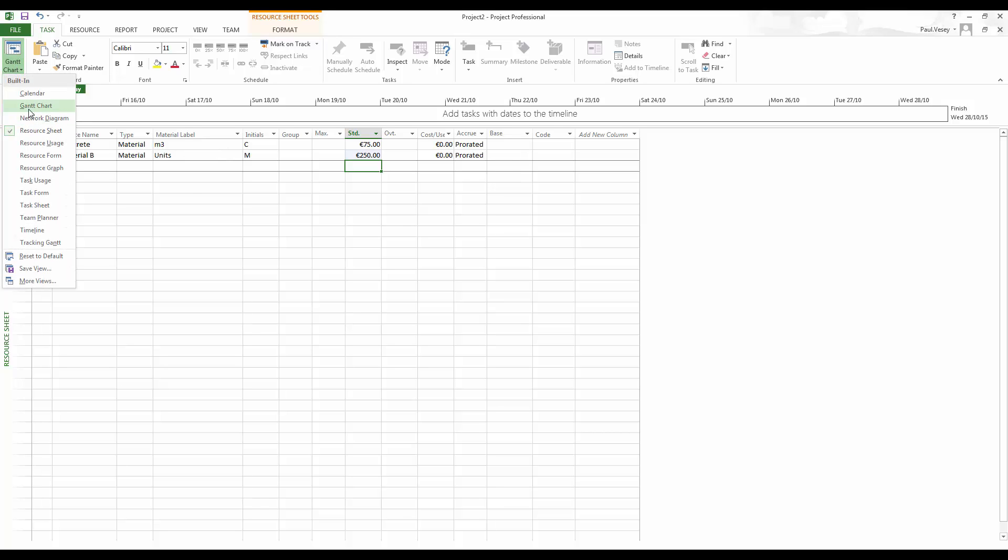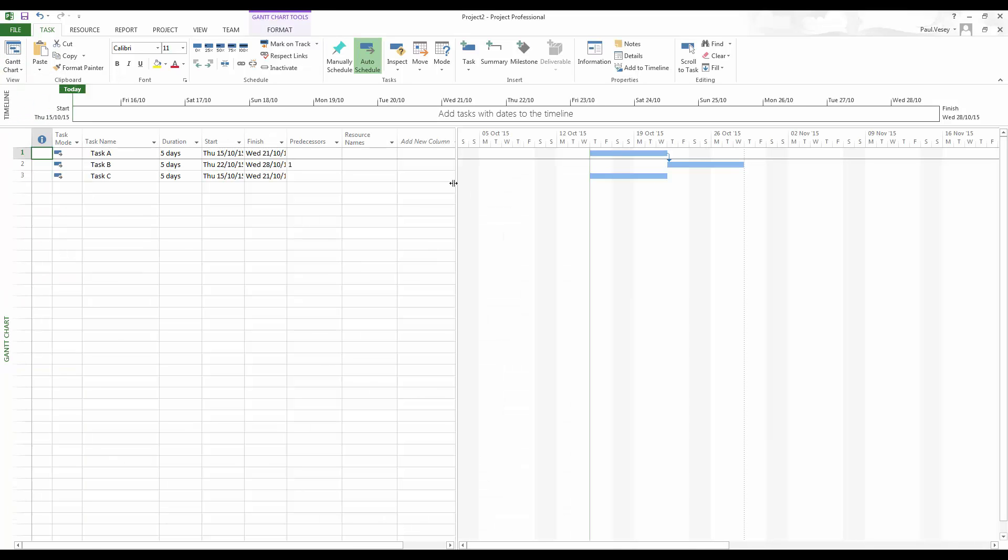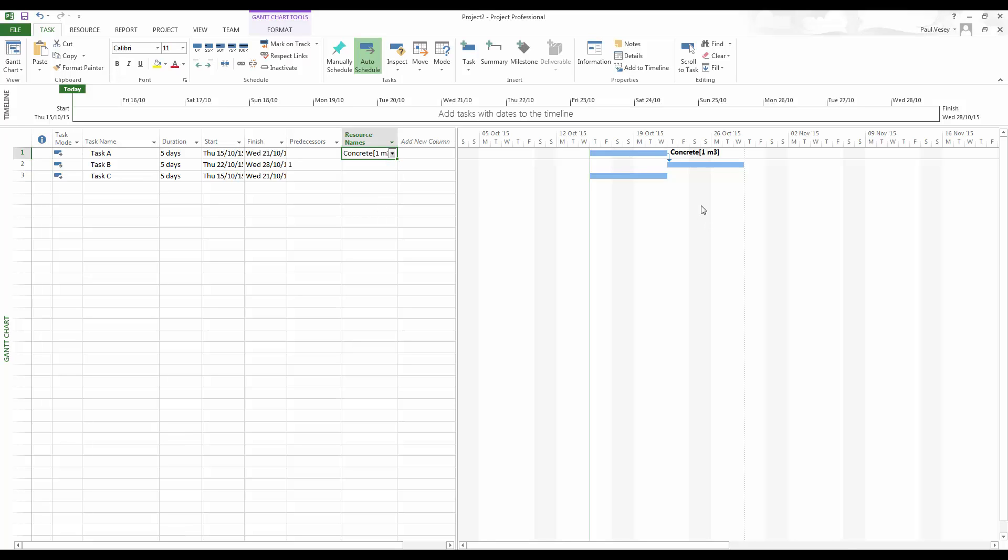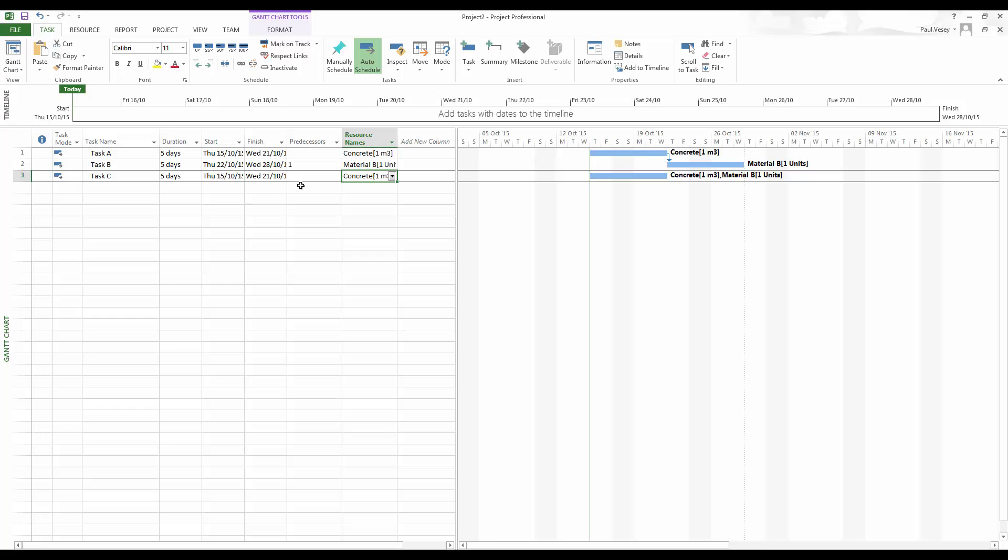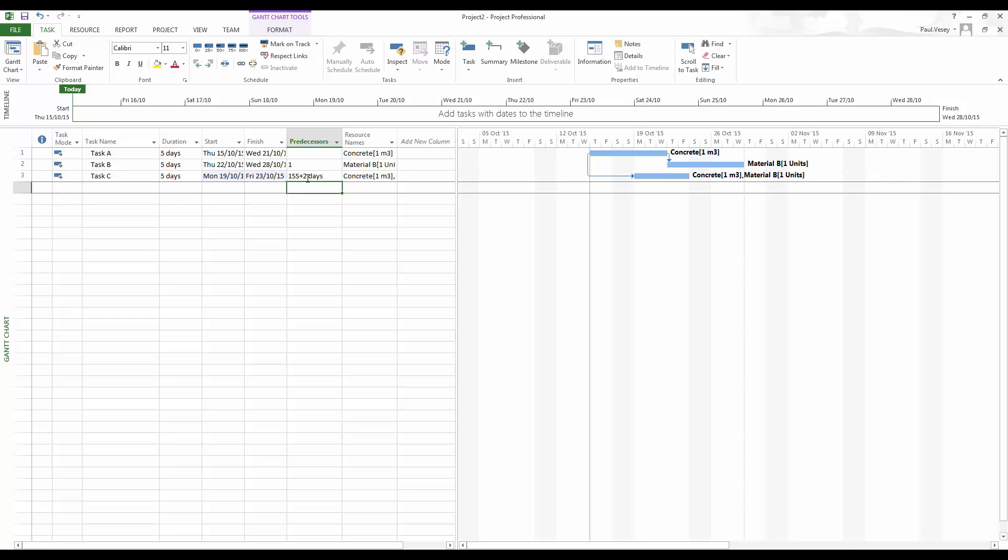So if we flick back into our Gantt chart, we can go along and we can start assigning these. So I'll put the concrete on the first one. And you can see there it's assigned concrete and it's a total of one meter cubed of it. I'm going to put on the material B in the second one and I'll put on both for the other two like that. Maybe I will just show something different here. I'm going to have this as a predecessor of one start, start plus two days.